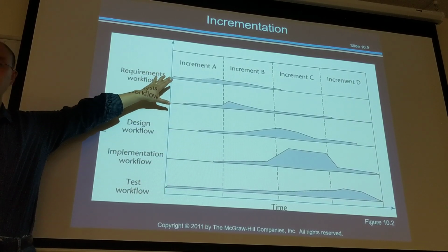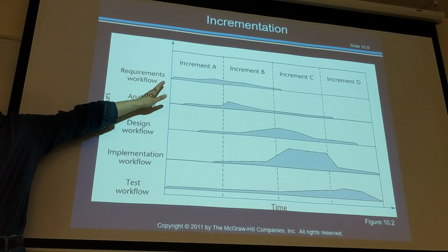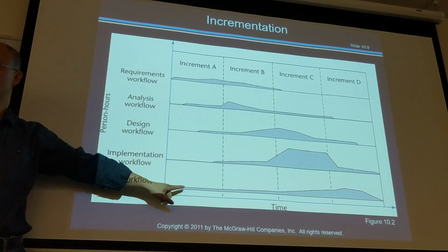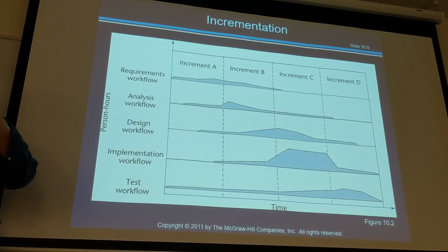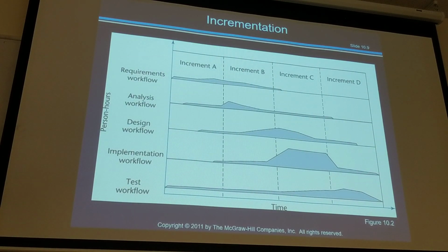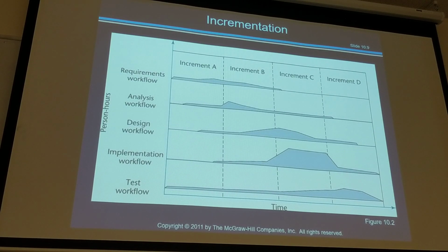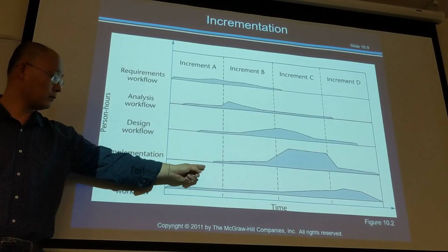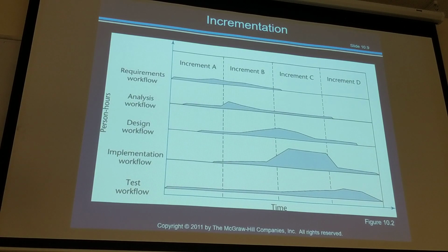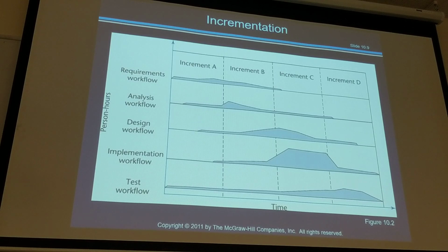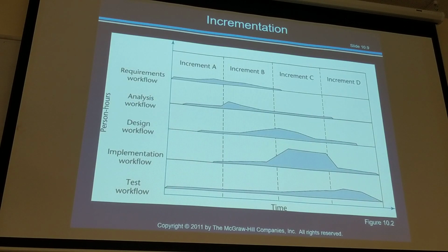Here you spend a lot of time figuring out the requirements because you don't know things well at that point, but you already need to do some implementation to demonstrate to your customer you are getting the concept and be able to deliver the first prototype for them to try out. The reason you give the first prototype is that the prototype will help you gather further information back from your customer so that you can use that to refine your own design.